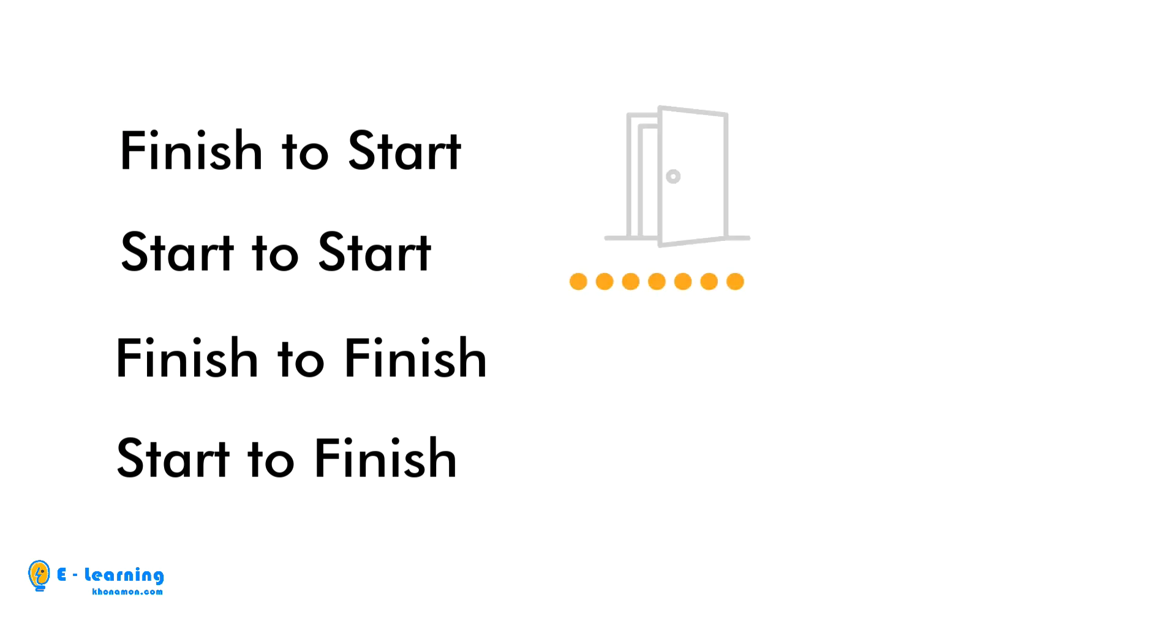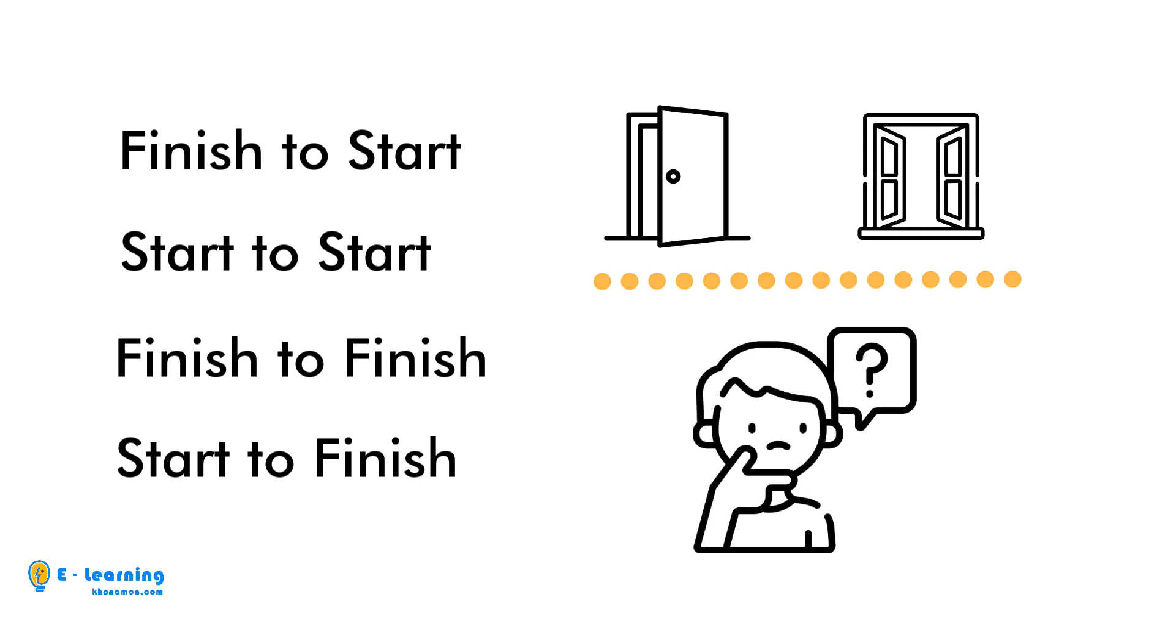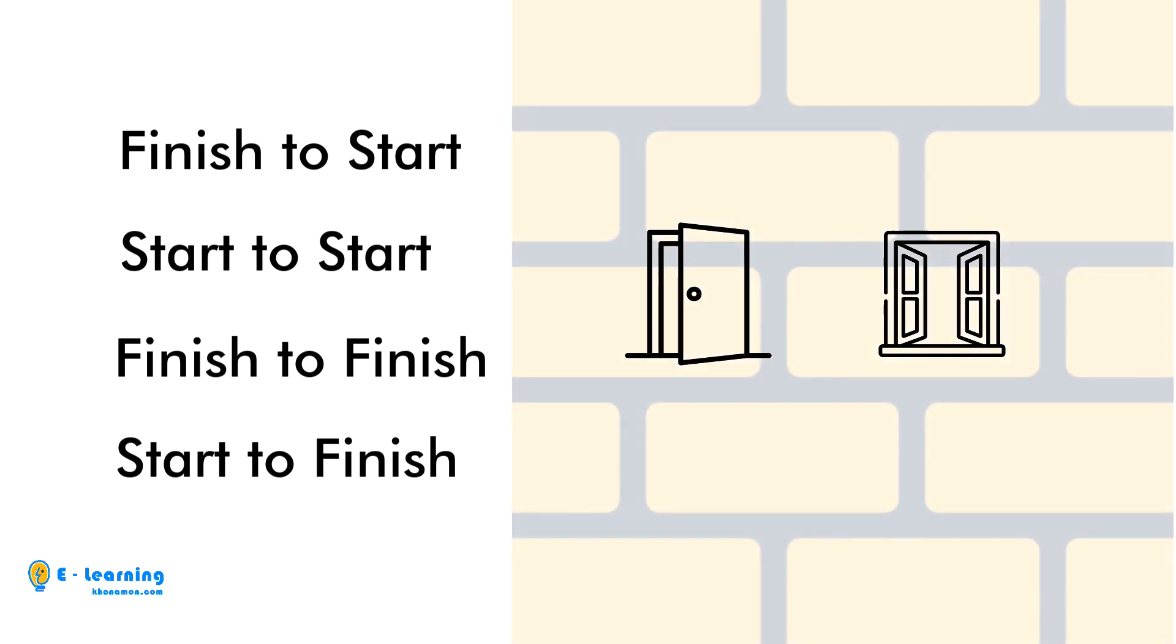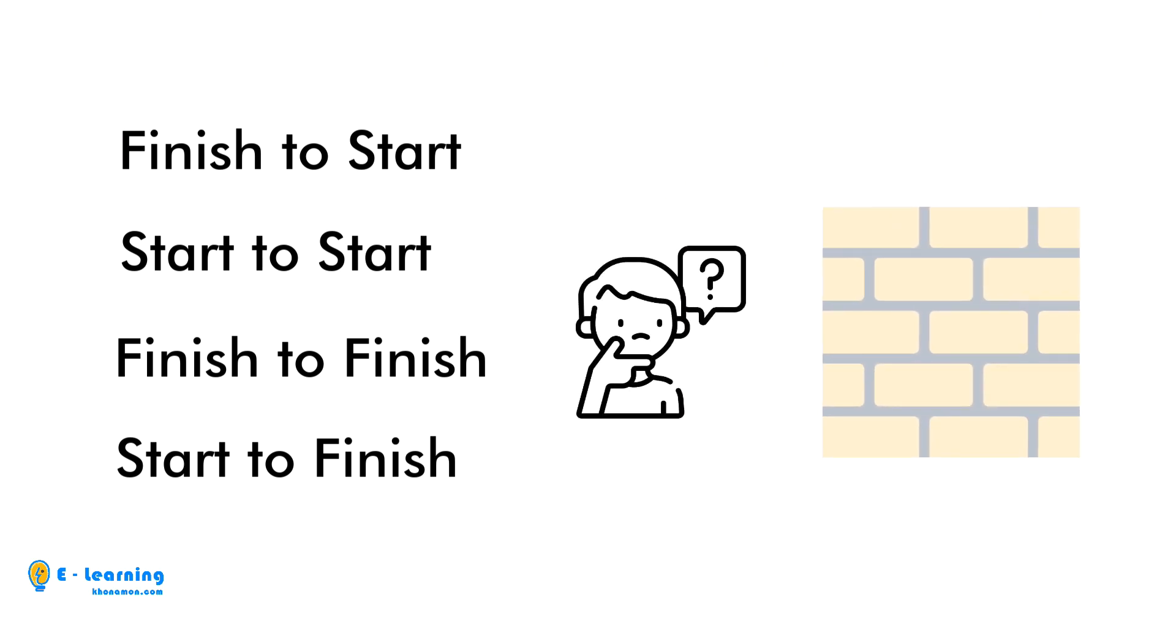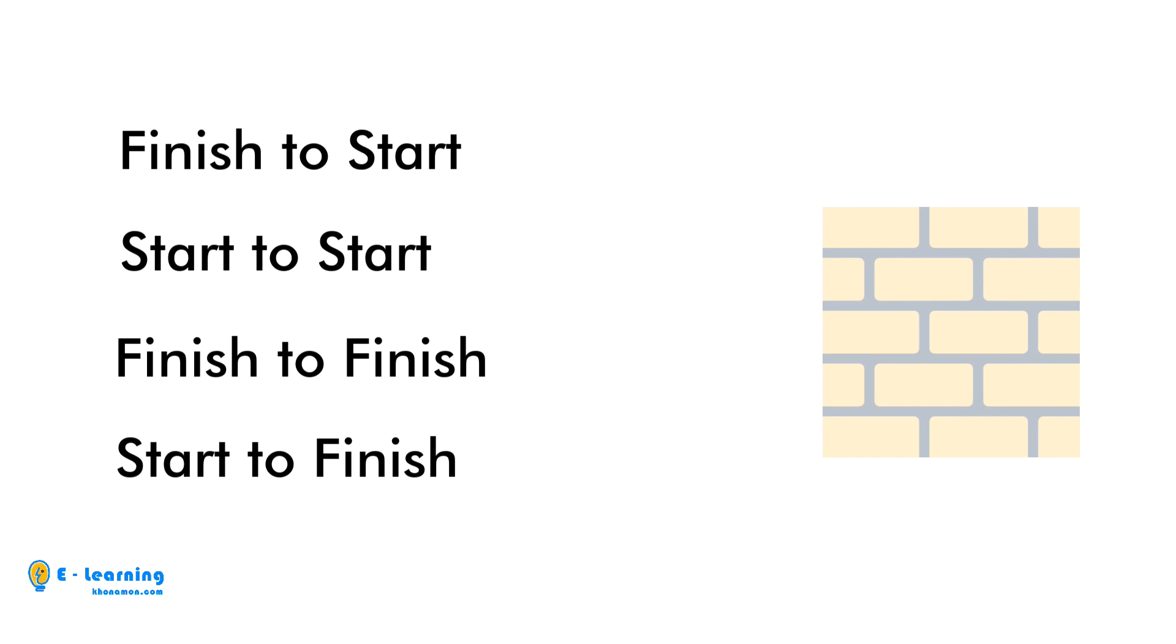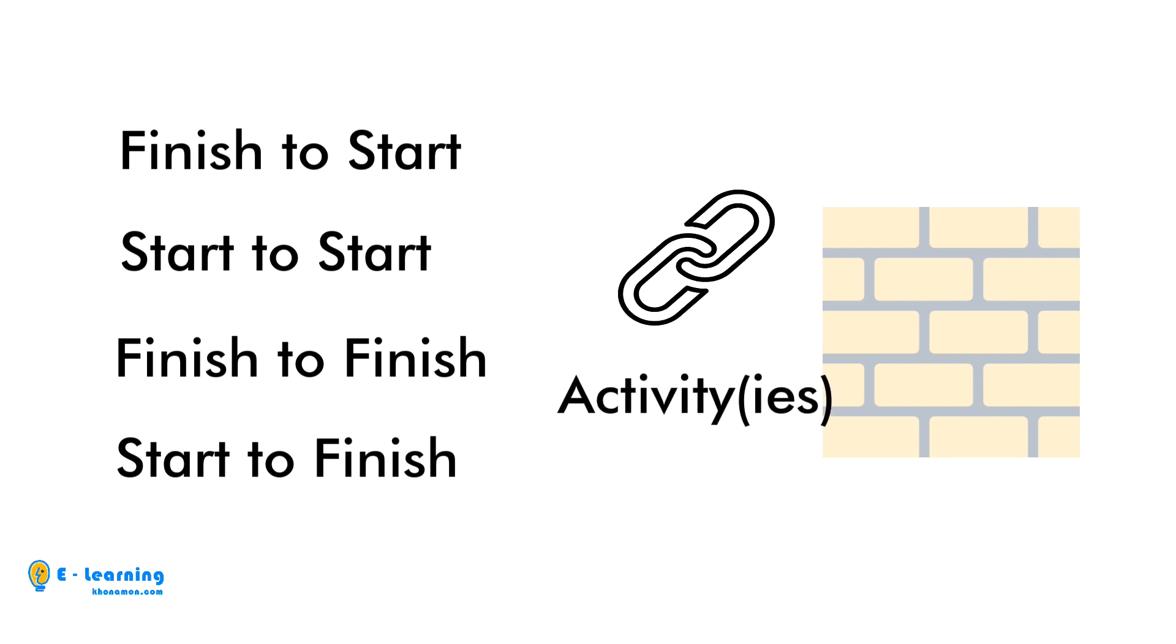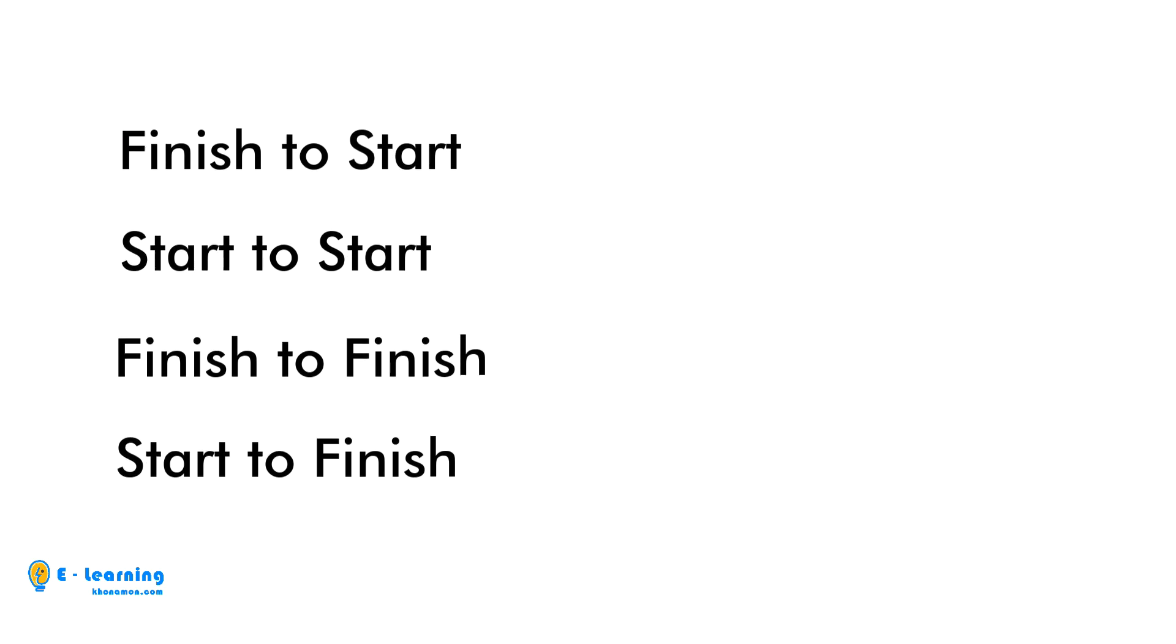We know how much the installation of doors and windows will take, but I don't know when we should start to install them because after finishing the walls we can. So we don't know when we will finish the walls because it is also linked to other activities. In Primavera, with these relationships, we can notice where we are standing.